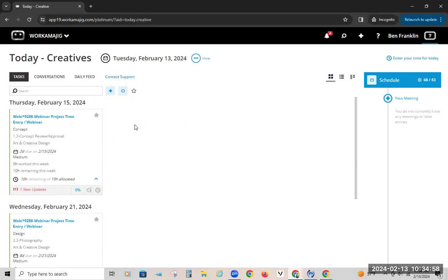So based off of what we did, we assigned him to that concept review and approval. He's art and creative. He's got 2 days to do it. So it's not due today, but he probably wants to work on it. He was given 10 hours. So we have 10 hours remaining out of the 10 hours allocated. So that's how you read these cards. And then obviously, once they've worked on it, they want to go ahead and put their time. So all they have to do is click on the clock icon.